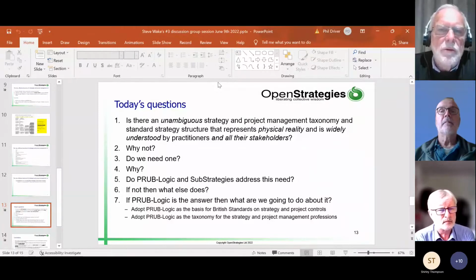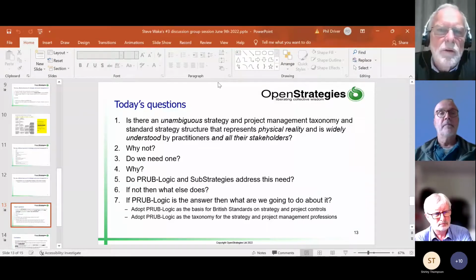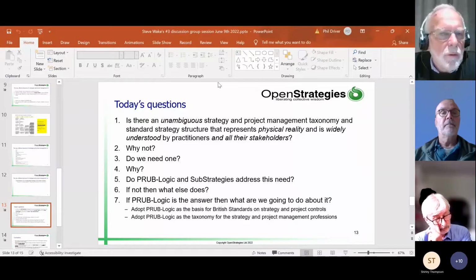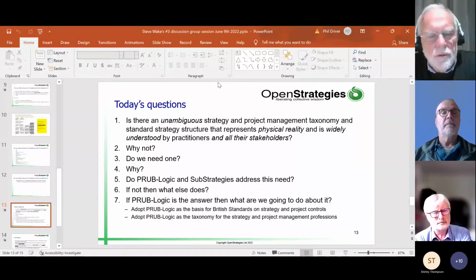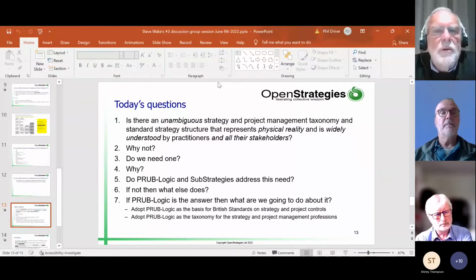Focus first on uses. Don't talk about objectives and goals and those other things, because they leave you with a very fluid conversation that goes all over the place. Whereas if you get people talking about uses, what do you want to do? And then benefits, why do you want to do that particular thing? When do you want to do it? How often? Then you'll find the project results pop out quite clearly.